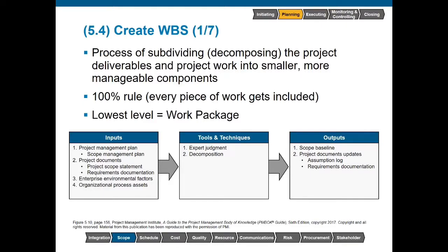It's very important that we do capture everything within the WBS because this is going to be our starting point as we'll do further decomposition in subsequent planning processes to come up with our estimates for what type of resources and how much money we're going to need to complete the work. So if the work is not captured as part of this process, then it won't be scheduled and it won't be funded. Now, does that mean that we don't have to do the work?